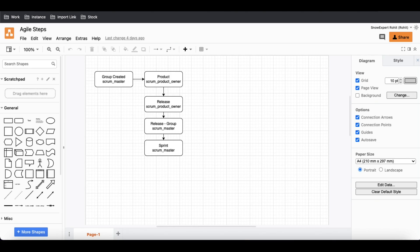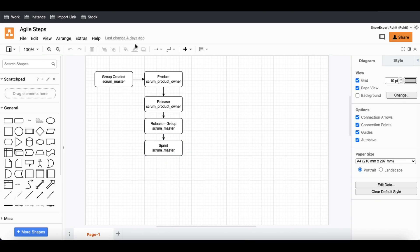Before we start, remember this is the flow I have designed for you. The group is created by the Scrum Master, then the product is created by the Product Owner, then the release is created by the Product Owner. Release and group mapping can be done by the Scrum Master, and then we have a sprint created by the Scrum Master.